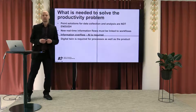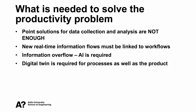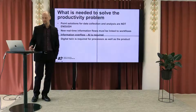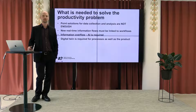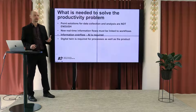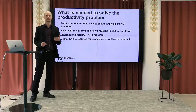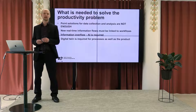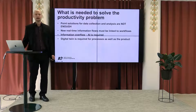Currently we have point solutions for data collection and analysis, but they are not sufficient, because you still have people looking at videos and point clouds separately — they all must be integrated into one seamless system. Workflow information includes procurement tasks, schedule tasks, and design tasks, and all real-time information from sensors or reality capture must be linked to these workflows. When companies implement these technologies, they suffer from information overflow. The superintendent can see from his app that plumber 5 is in apartment A36 — but so what? It is not terribly interesting unless you have some kind of analysis and KPIs on top of that information, automatically combined with all other streams of information for it to be relevant.